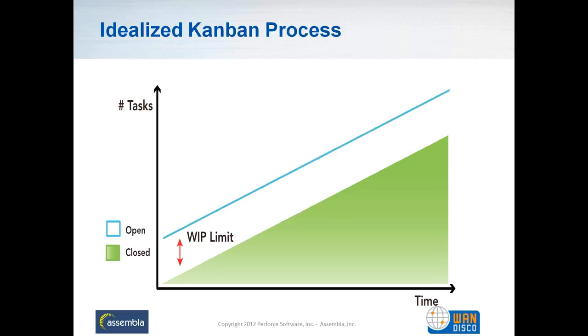One of the problems with Scrum is that you have to get everyone together to do an iteration plan. It's actually possible to skip the iteration planning and save yourself a bunch of time if you use a Kanban process where each contributor, each person just pulls one task to work on. So you only have a number of tasks in your work in progress, it's called your WIP, that you can work on any given day. You don't have to do much estimating with this either because you don't have to say when you're going to finish. You just have to make sure that you're working on it. And you continue this process infinitely, finishing work.